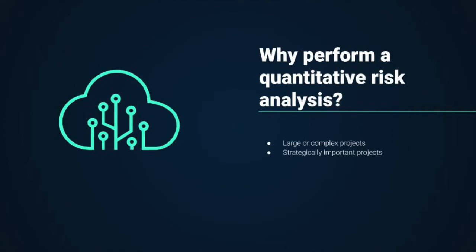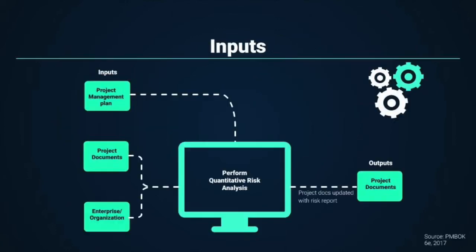So, why perform a quantitative risk analysis? It's not always an appropriate tool to use. Certain projects aren't big enough or critical enough to justify the costs. It's really most appropriate for large/complex capital projects that have a lot of uncertainty around them and projects that are strategically important to the organization. So projects that are critical to the future of the company really merit this level of analysis.